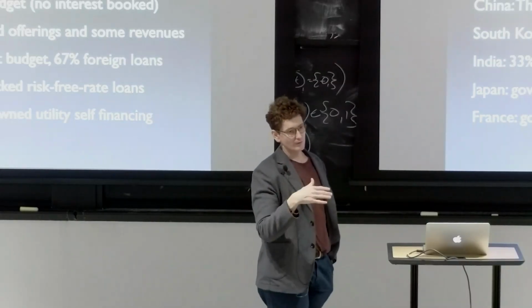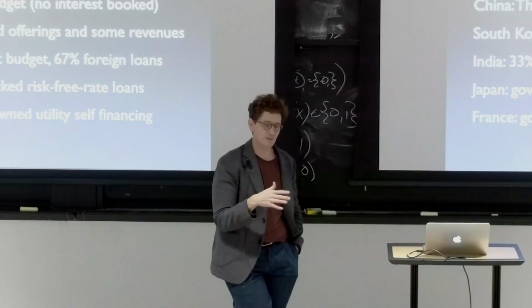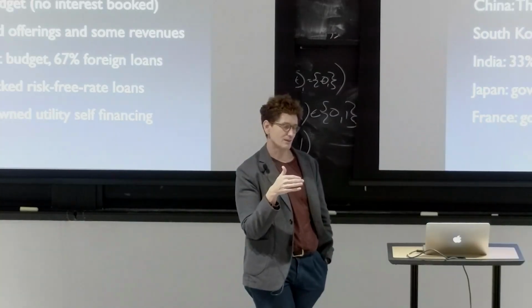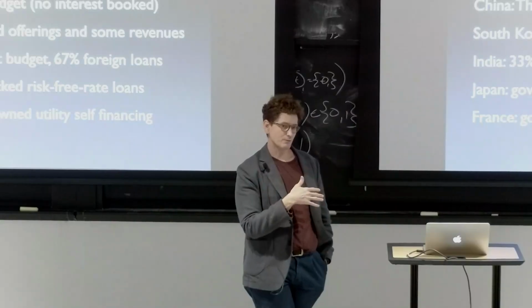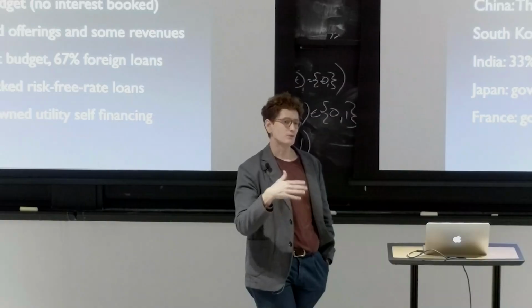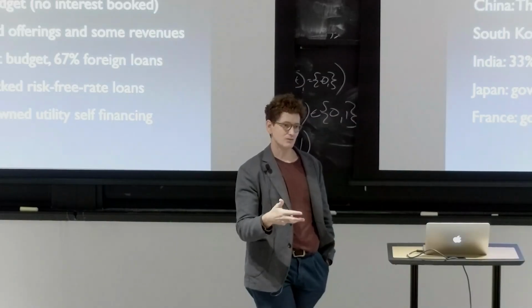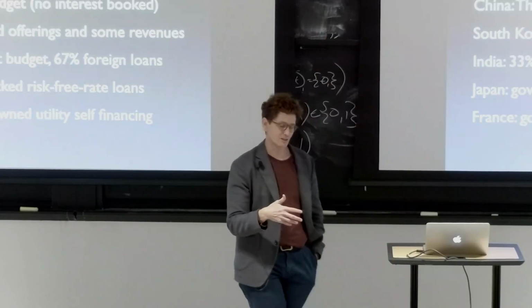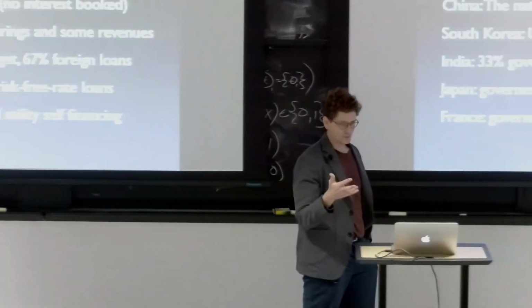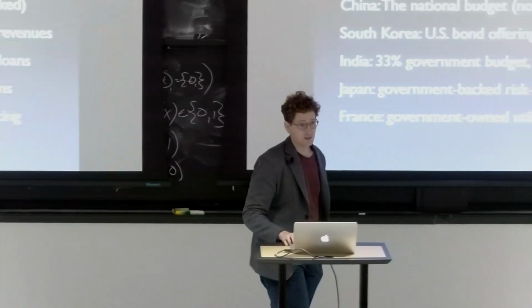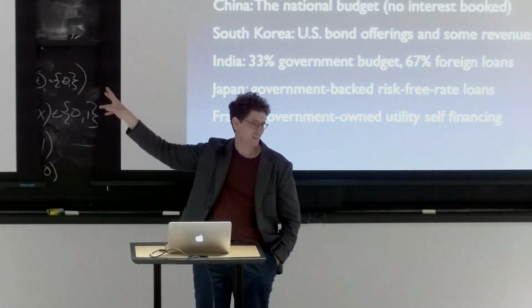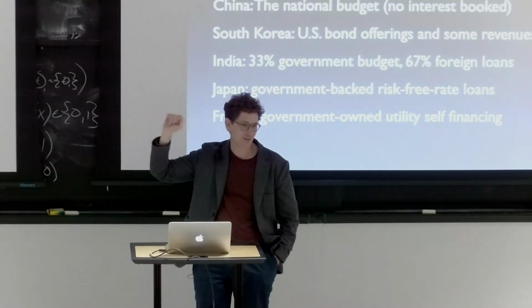And then Sumner also abandoned the project halfway through. I think they spent $7 billion on Sumner before the Public Utility Commission said, despite the fact that we spent $7 billion so far, we still determined that the remaining costs will be so high that it's not in the interest of our customers to continue with this project. So they closed the project. Only Vogtle survived of the 29. So that's 2 of the 29. And it happened because of all of these shenanigans to basically get free money from the public and sue Westinghouse.